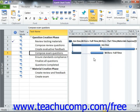However, you can only split a task into the smallest increments that are displayed in the timescale view in the bar chart area within the Gantt chart. So for example, if you wish to split a task by hours, then you must ensure that the smallest time increment displayed in the timescale area are hours.